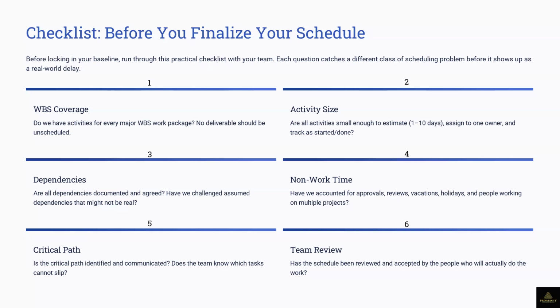As the project begins to progress very slowly, we might change it to bi-weekly. So you are going to be asking them where they are with the work, how they are progressing, and whether there are issues. One of the things we're asking is whether we are still able to finish on a particular date. If they say no, they have to give you reasons. The reason you're able to ask is that they've committed to it. They committed that we are going to spend 10 days, and now it's 15 days. Why is it 15 days? They have to explain it.